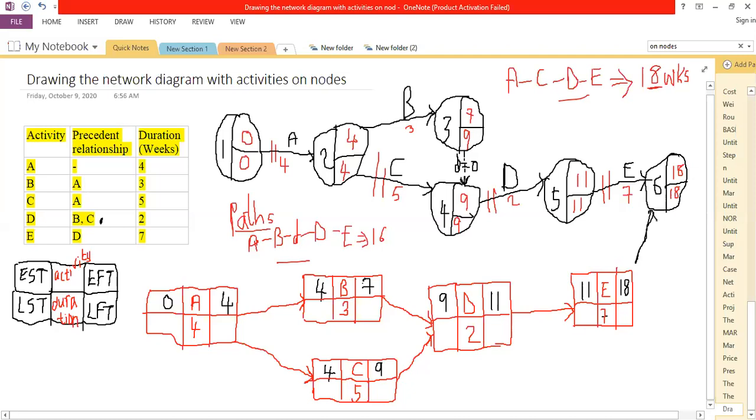The only difference is the style you use as you're representing a network diagram. The earliest that we have finished activity E, marking the end of the project, of course being the 18 weeks, should be the latest finished time also for the same activity. And it becomes the project duration that we have as our 18 weeks. We are now moving backwards, class. We're using the backward pass.